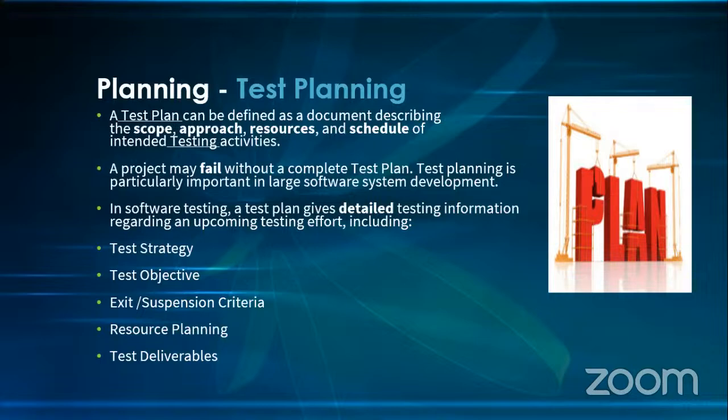As you are testing, you need to be looking. We said within 2 days we are going to finish X number of test cases. Is it still the same as of today? No, it's not. It's exceeding to 3-4 days. You need to be transparent. Our testing is going to be moved to 3-4 days due to the fact that you give a reason. Development was delivered to us late.